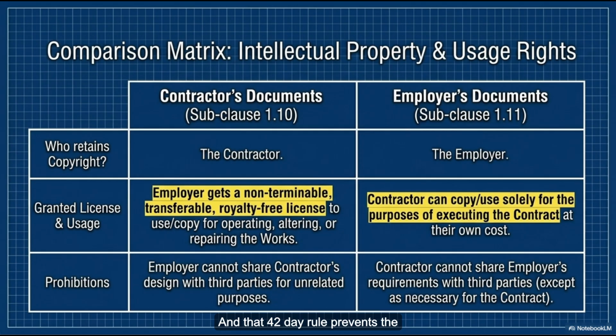And that 42-day rule prevents the contractor from playing dumb. What do you mean? Well, they cannot knowingly build a doomed structure just because it was in the employer's blueprints, wait for it to crack, and then demand to be paid twice to rebuild it. Oh, wow. Yeah, they have an active duty to scrutinize the plans.